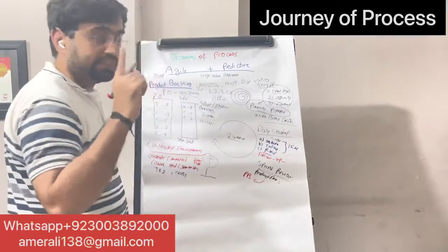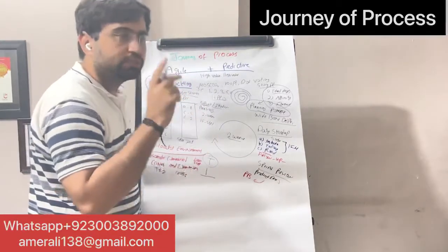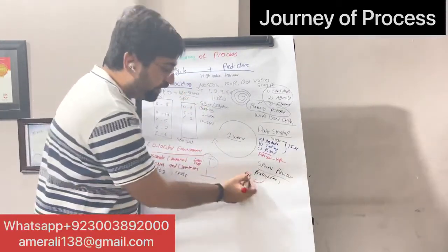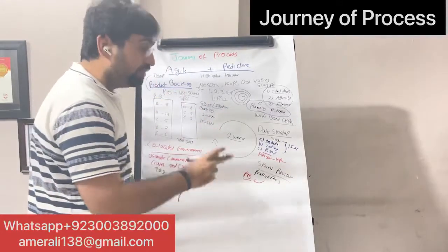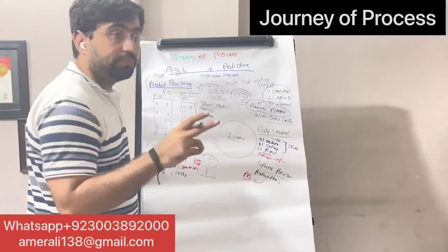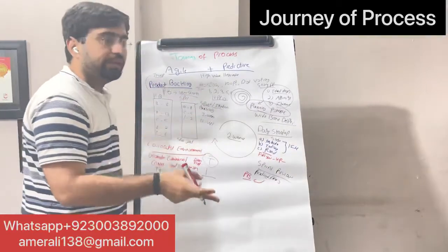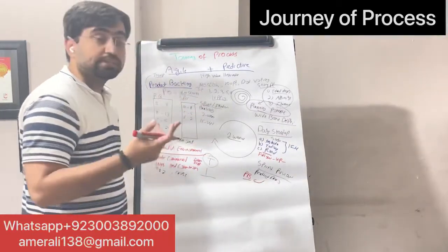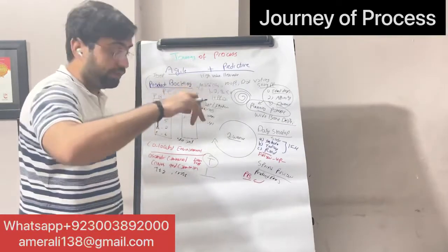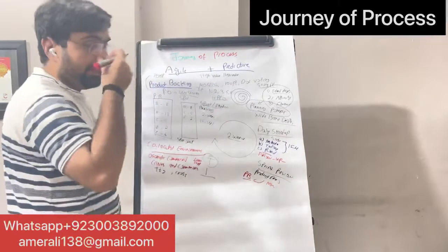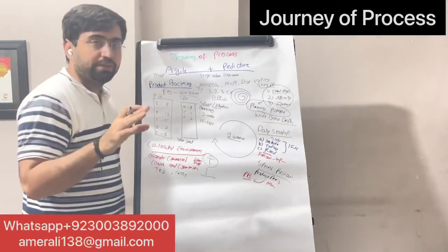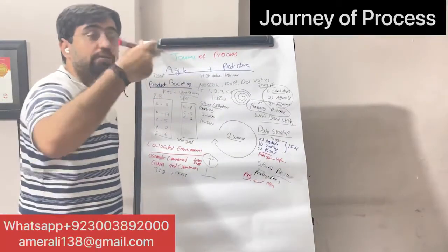If a user story is rejected, or if a user story is not completed, it goes back into the product backlog. So that is a very, very important thing. Even if it is not completed 99%, it goes back to the product backlog. If the customer wants to add a new requirement, the customer can add it at this step. At this step they can add new requirements, and we have a product backlog increment.